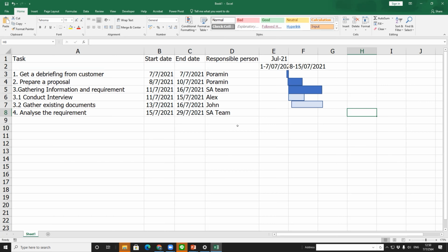So if they say, okay, firstly, they plan to let you finish all the tasks in this project within 20 working days, on the assumption that you finish studying the new tools within 5-6 days, but now you do it faster, that means you said you can finish studying this new tool within 5 days. That means the time is shifted 1 day quicker. So from 20 working days, now it becomes 19 working days, because the time you spend to study the new tools decreased from 6 days to 5 days, something like that. Okay, so this is the example of the Gantt chart.